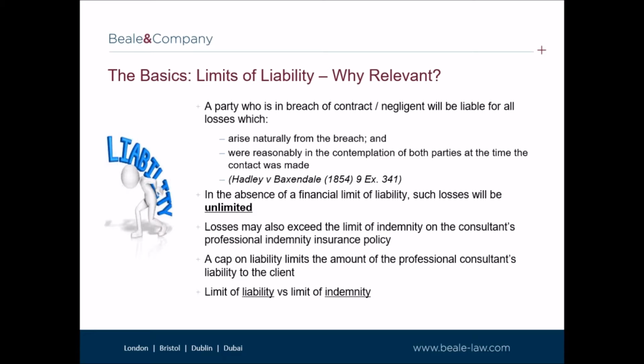An obligation in an appointment to maintain professional indemnity insurance does not limit a professional's liability to the amount of cover provided by that insurance. A separate express clause is needed, agreeing that liability should be limited and the level of that limit.